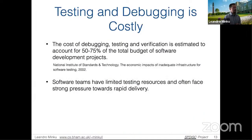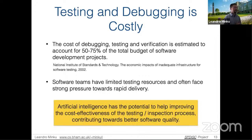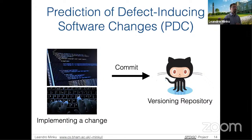The cost of debugging, testing, and verification is very large — estimated to account for 50 to 75% of the total budget of software development projects. Even spending all that time and money, software teams still deal with limited testing resources and very strong pressure towards rapid delivery. The good news is that artificial intelligence has the potential to help improve the cost-effectiveness of the testing or inspection process, ultimately contributing towards better software quality. One of the ways AI could help is through prediction of defect-inducing software change, PDC.